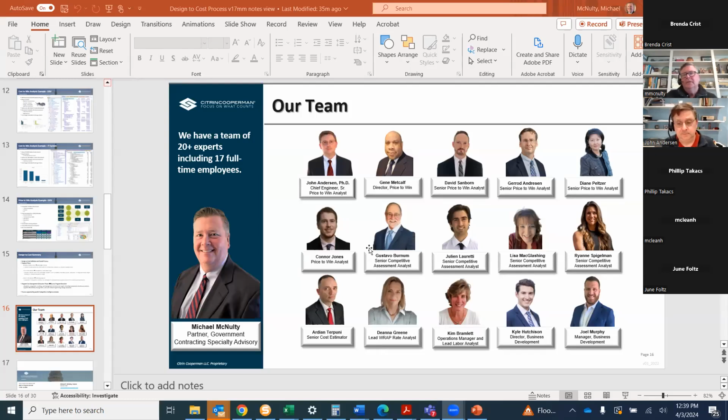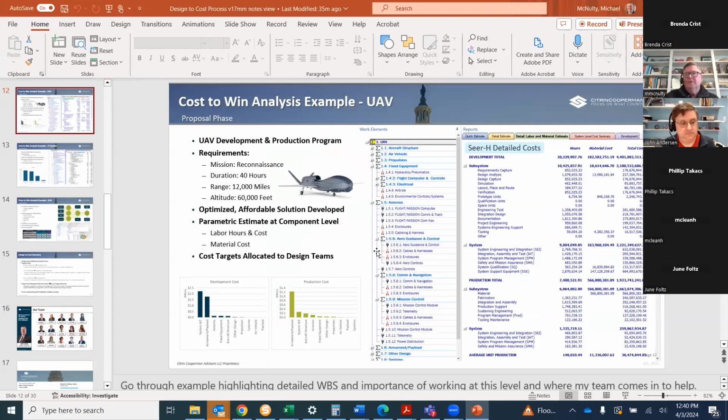So I wanted to show this. So to the question of talking with executives and even to other stakeholders, subcontractors, teammates, and so on, this kind of work right here is absolutely essential because out of all this, you might imagine, there are things like confidence curves that can be built, which indicate the likelihood that you're going to be able to do this at the cost and prices that you have in your model. And confidence curves are S curves.